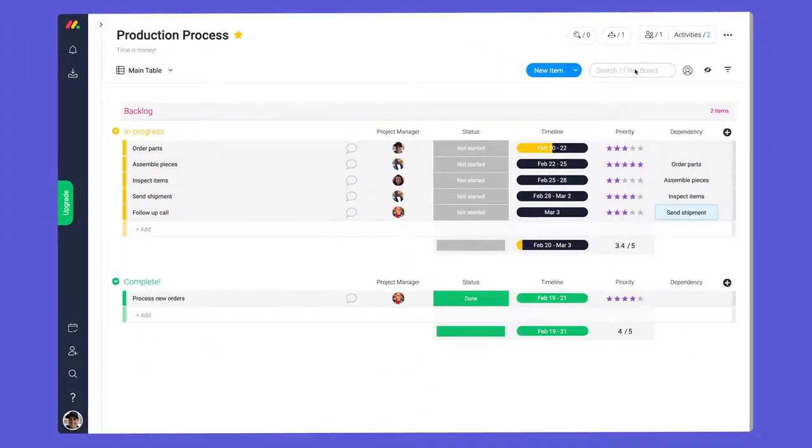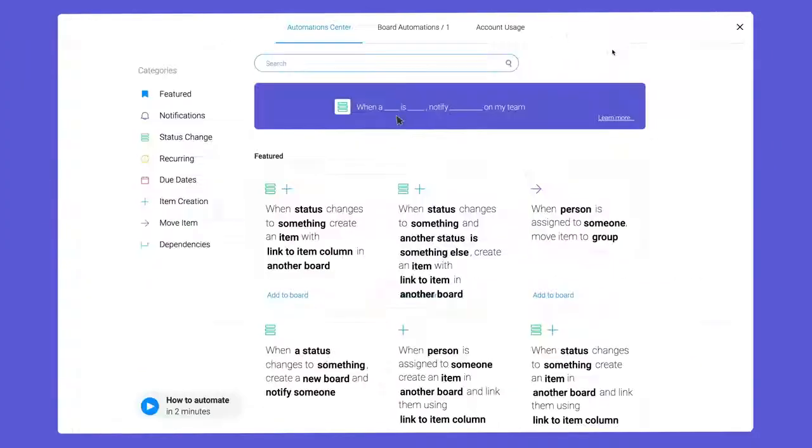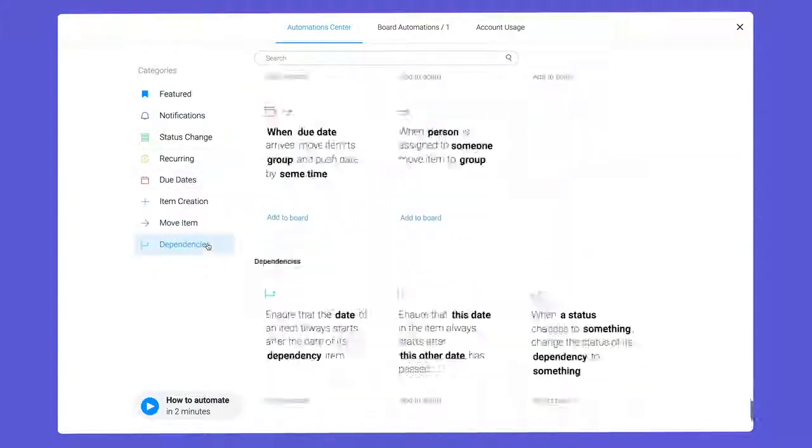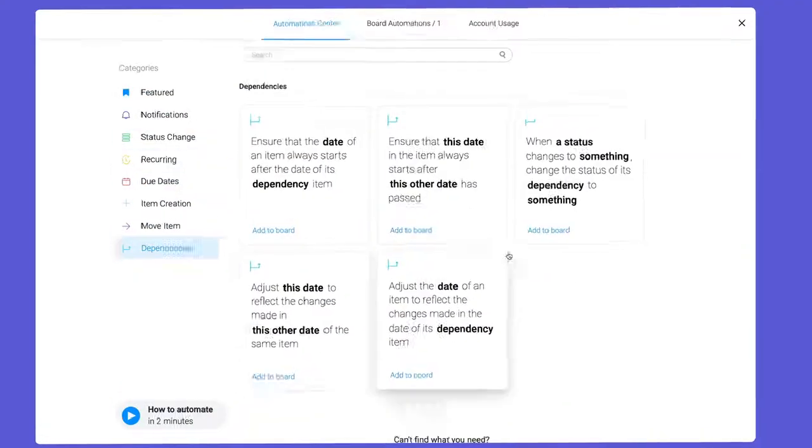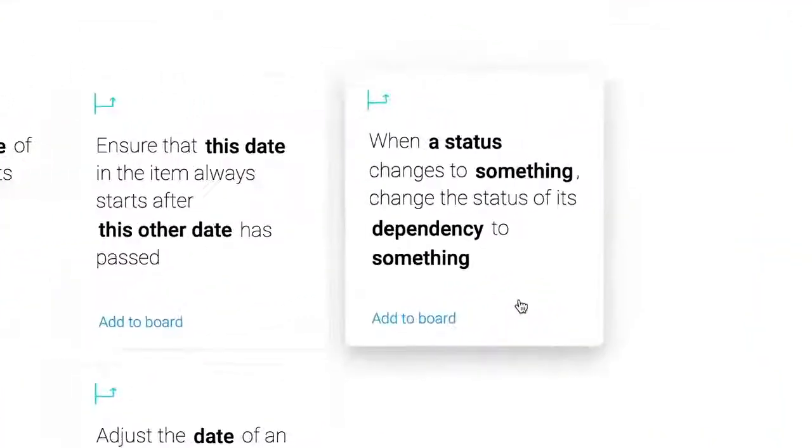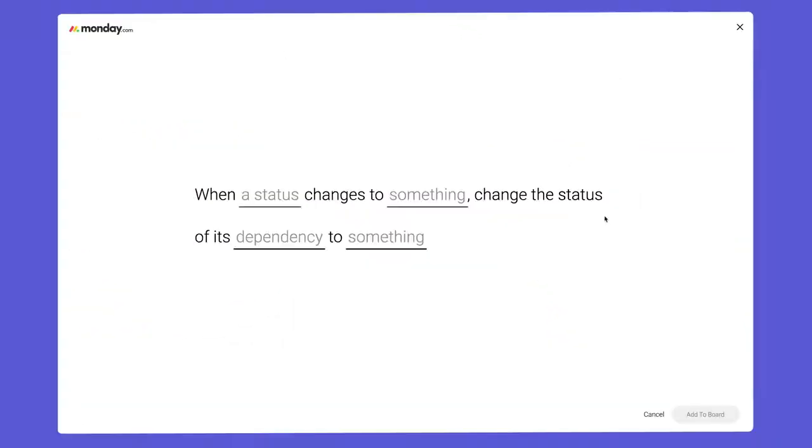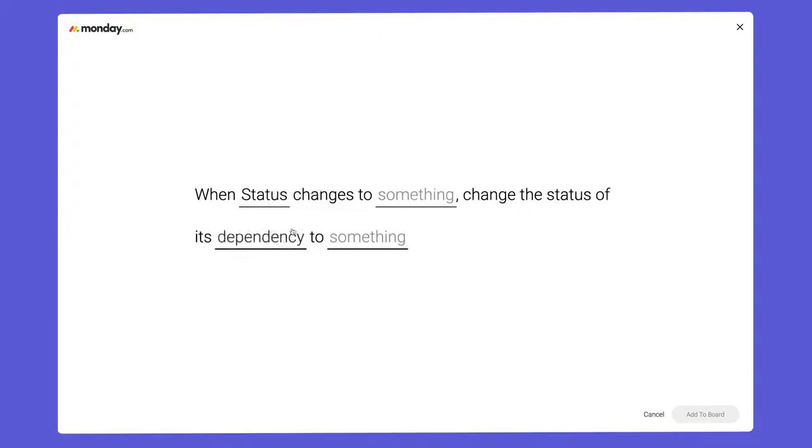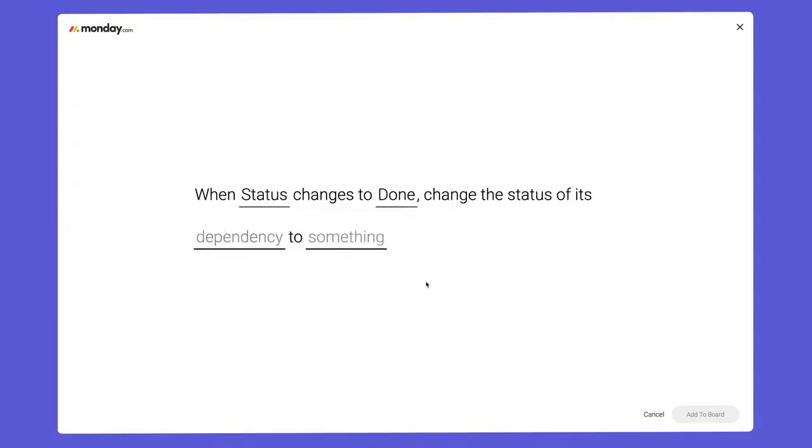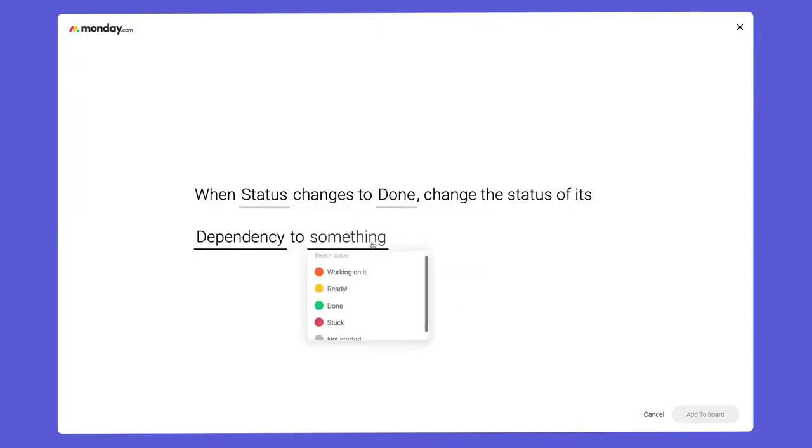Now, we'll head back to the automation center, select dependencies, and add this recipe. In this case, we'll configure it to change the status to ready when the task above is marked as done.